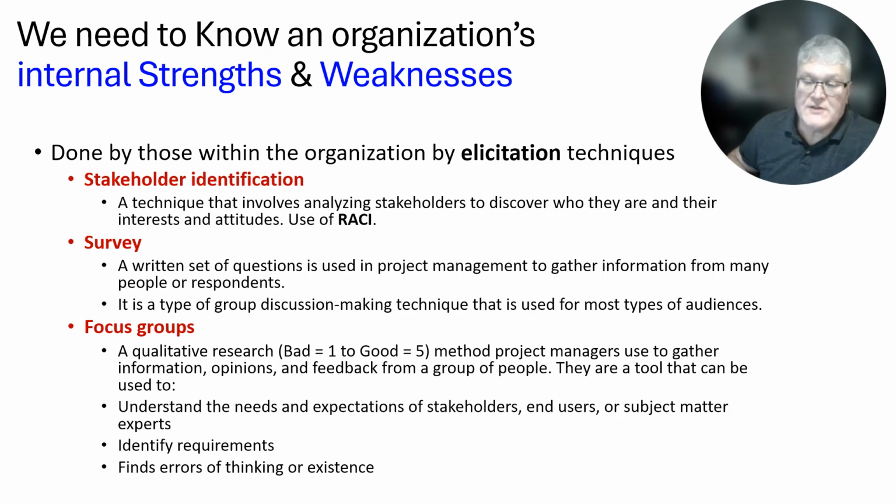Other elicitation techniques used include stakeholder identification, and specifically the use of a RACI chart. R-A-C-I, the acronym means responsible, so identifying which stakeholder is responsible, who is held accountable, who should be consulted, and who should be informed about something.